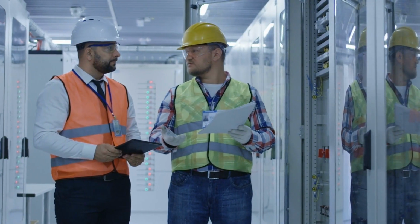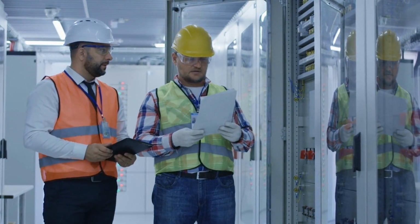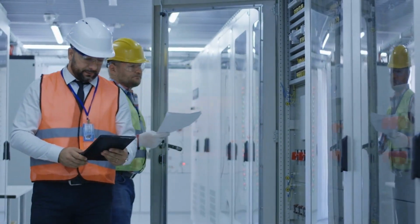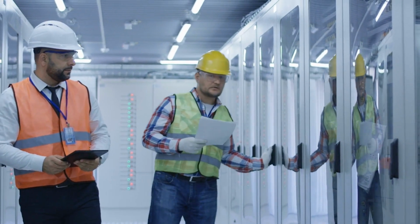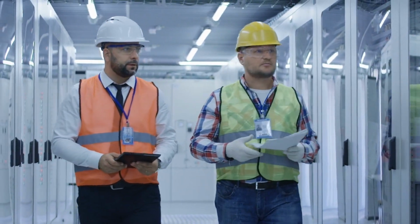Each equipment supply contract does not clearly define the details of off-site testing that is required in the factory. For example, if control and protection cubicles require integrated factory acceptance testing of both the hardware and the software and must be fully tested with any deficiencies agreed to before receiving authorization to ship the equipment to site, then these details must be included in procurement contracts before being awarded.